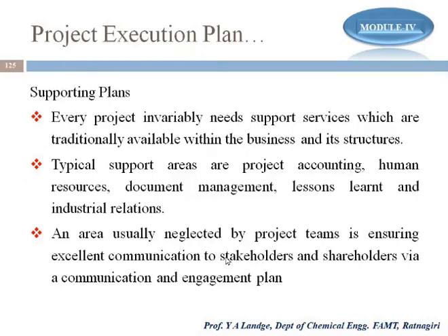So how the persons communicate with the stakeholders, how you take care of their queries, and how you can give the stakeholders confidence that your project is good and will be completed within time. So it's very important to have continuous communication, and we have to plan it: who is the communicator, how he will communicate, at what step we need to communicate. Because you are not giving a report every day, but once you achieve a milestone, you have to report to your stakeholders that we have achieved this part. All this comes under the supporting plans.